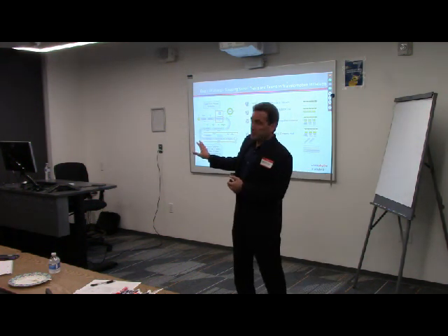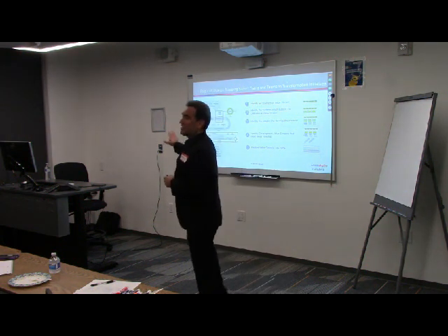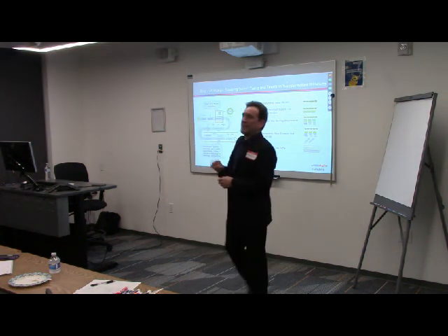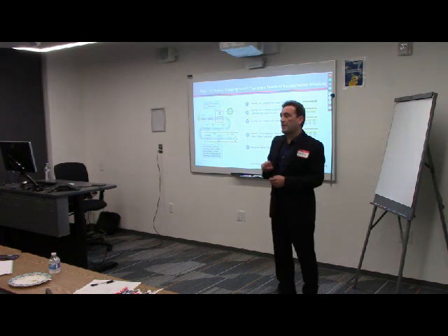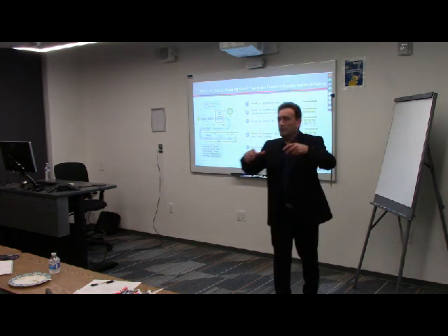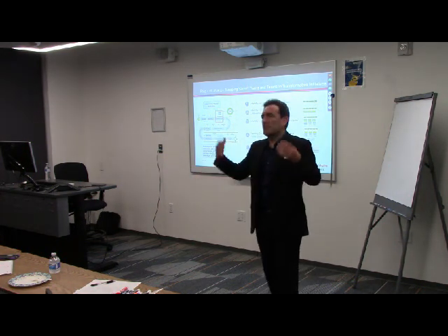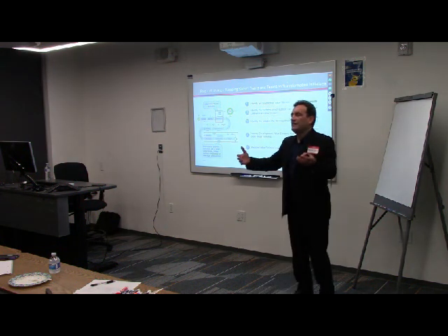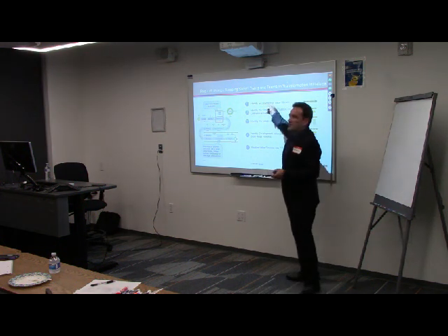Now, what I shared with you was analyzing in detail what you can do to improve them. In SAFe, the way it's used primarily is just to organize our effort. If you're going to have 10 teams, knowing which teams should be together and put into the same train, what's called an Agile Release Train, or ART, is how you start the process.